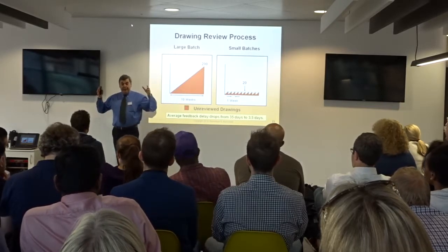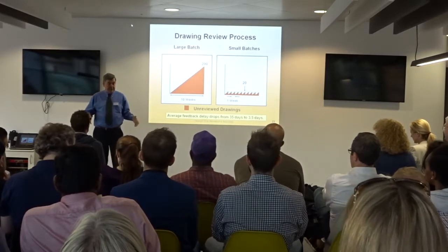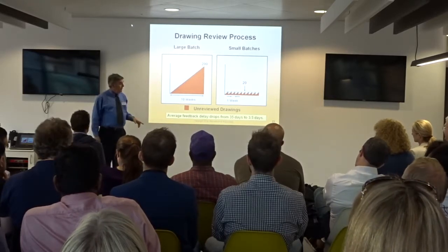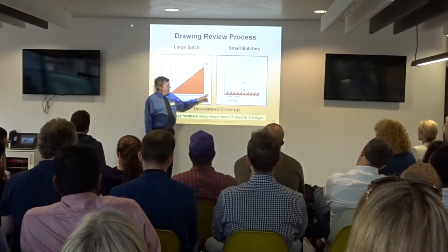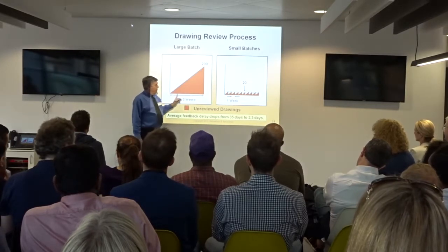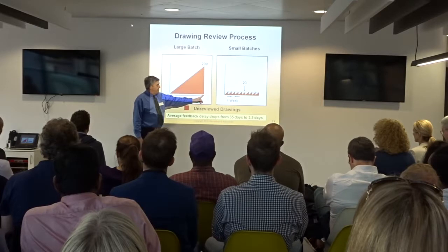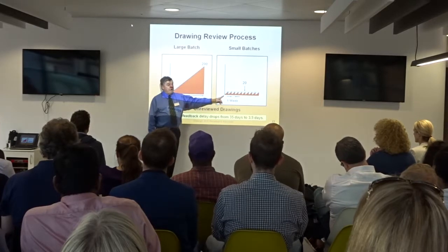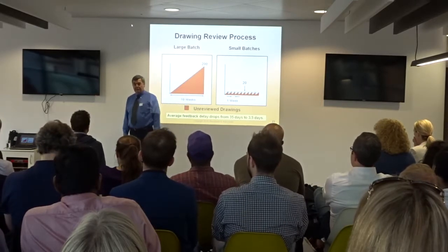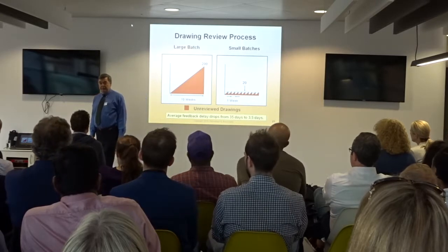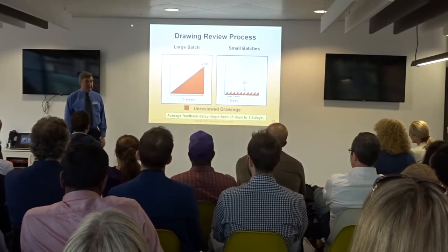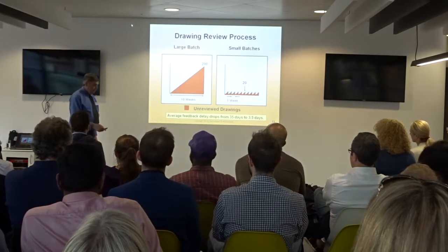They receive a batch of 200 drawings to process at the same time. In this process, they begin and they wait 10 weeks, they do nothing for 10 weeks, and then they receive 200 drawings. In this process, 1 week into the process, they have started processing the first 20 drawings. So it's only on the critical path for 1 week instead of 10 weeks.